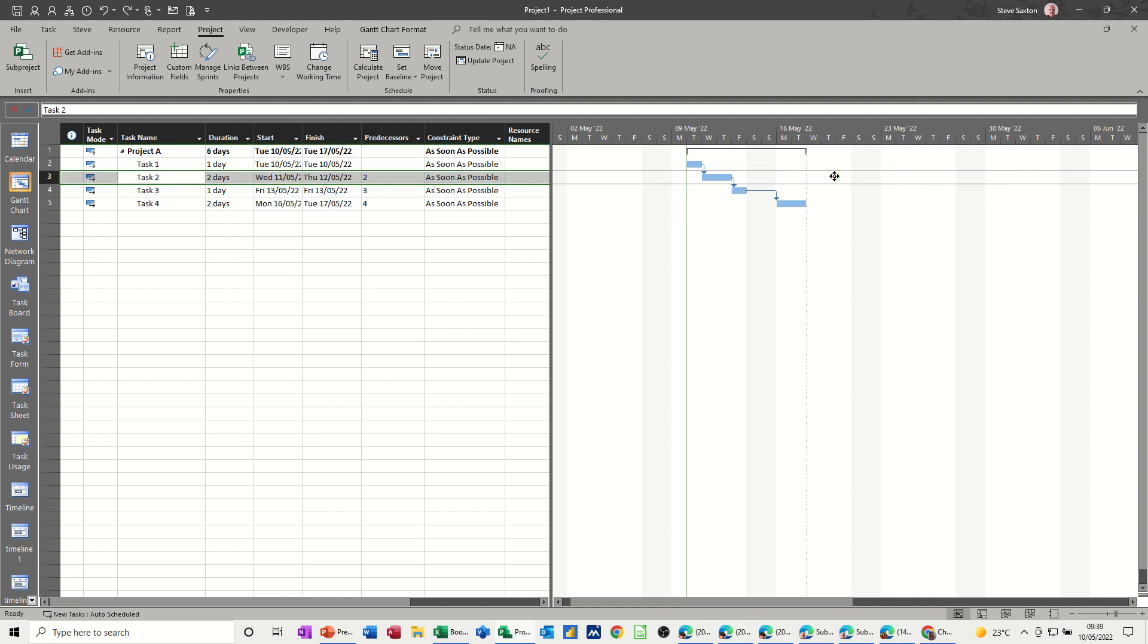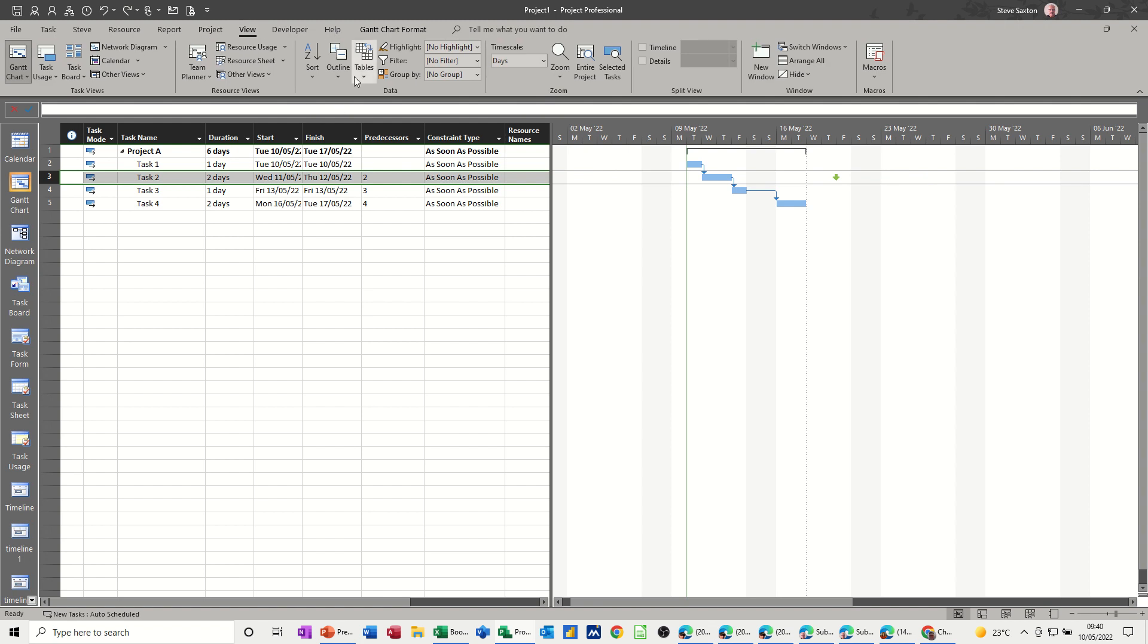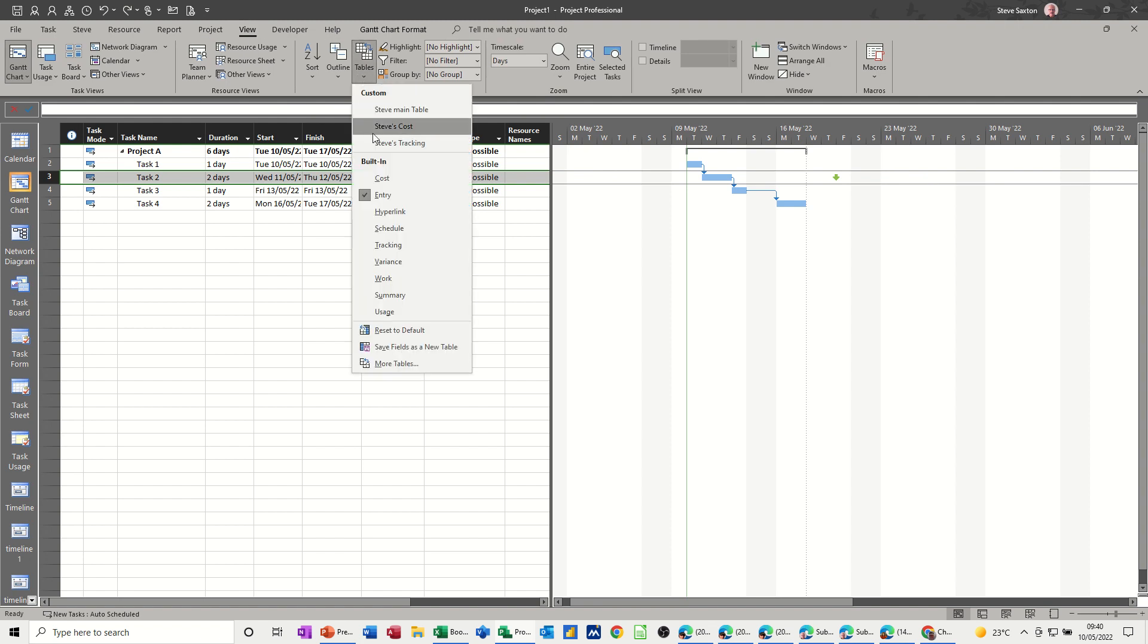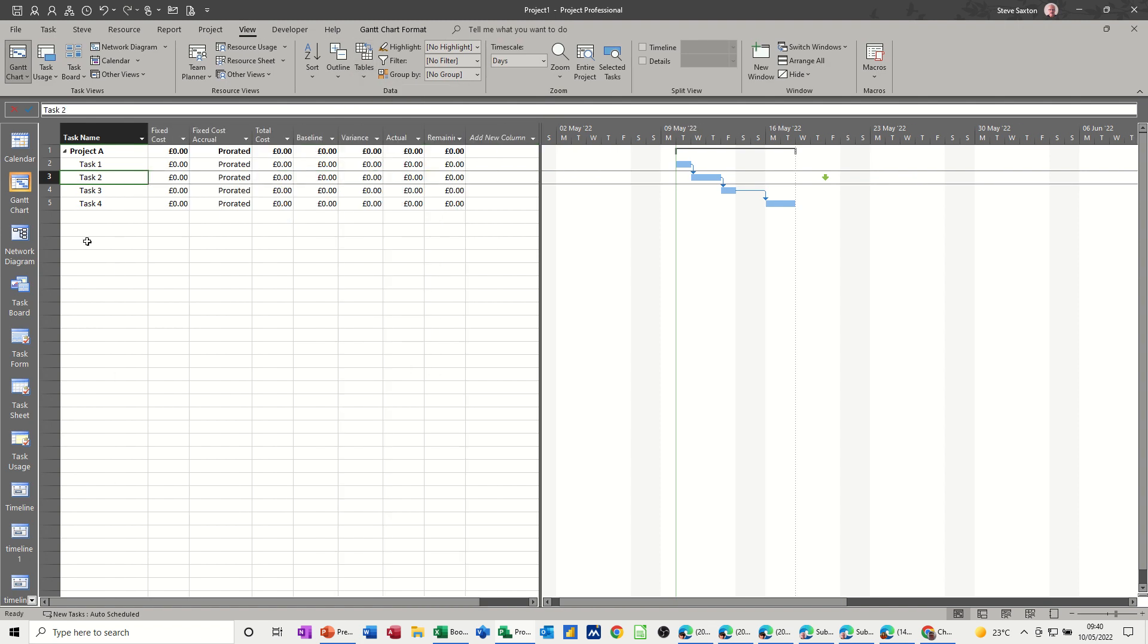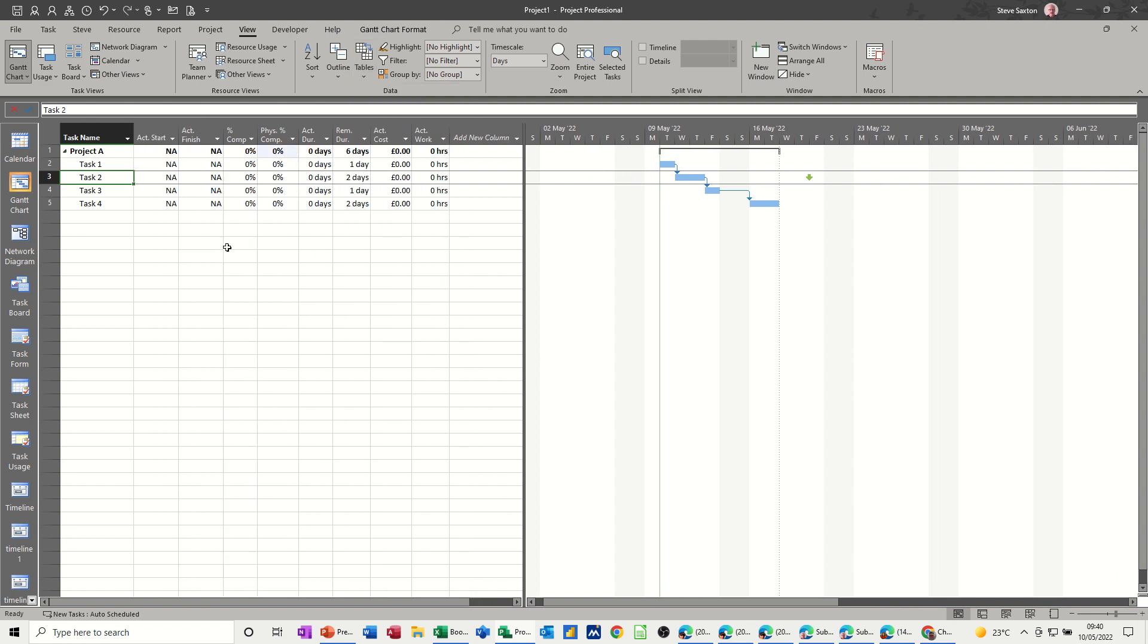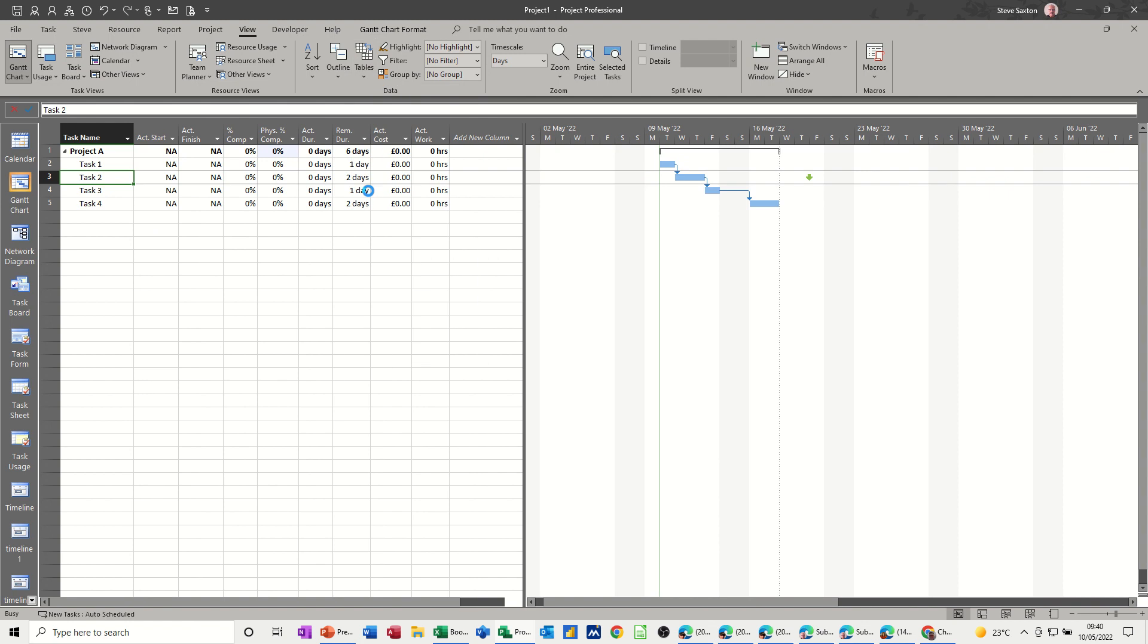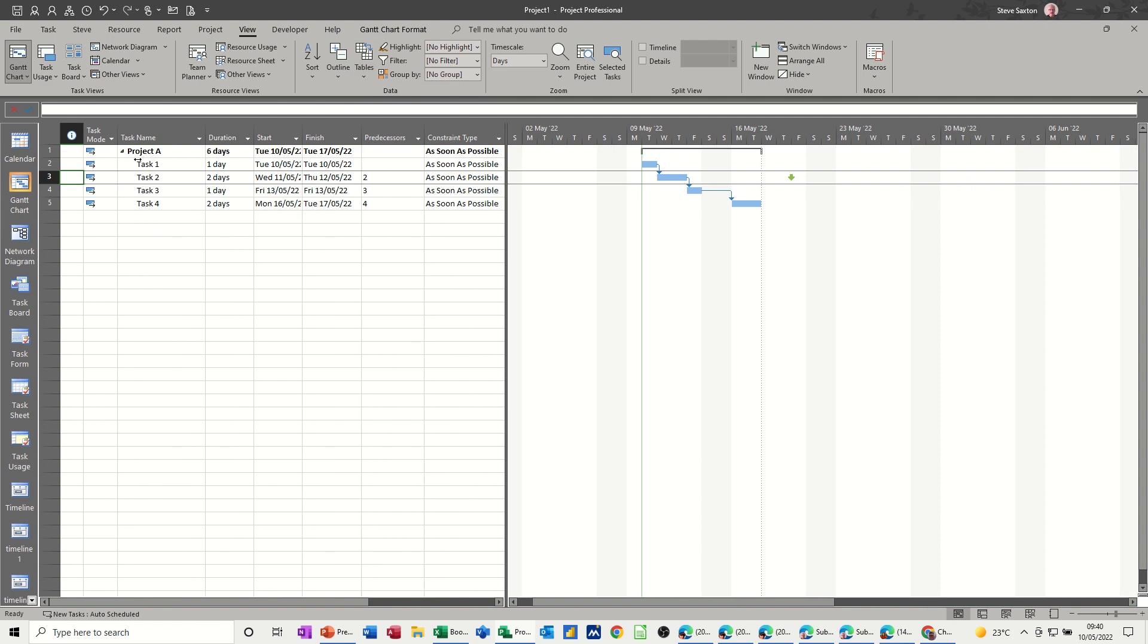To get rid of that, I think this is just a management information tool. And it's only going to be showing if you've got the information column on, because if I go into a different table, for example, the cost table, that column is not on as default. So whatever you're working, if you go to the tracking table, it's not on in the tracking table either. So it's on in the entry table. You can add it to any of these other columns, obviously. But just bear that in mind that you're not always going to see that if you're working in a different view down here.